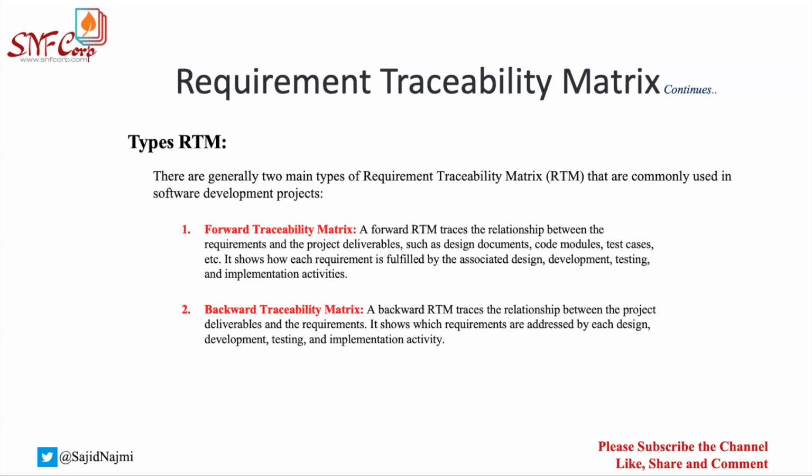So this is the simplest way for you to understand. Now, if you read these terms, these might be a little complicated and confusing to you, but the point I'm trying to make here is, you have something to find in SRS and you got that reference in your RTM, and you're coming from RTM to your SRS, it's a forward traceability. And vice versa, if you're coming from your SRS to your RTM, it's called a backward traceability. And what are you going to find? Anything, whatever is required at that point in time for you. Clear? Any questions, any doubts on this one?